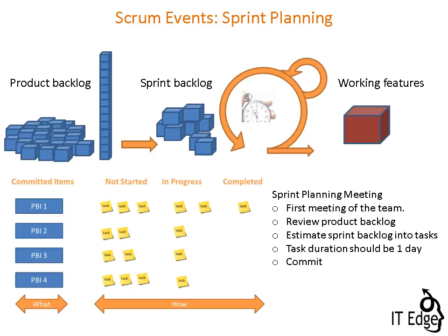The sprint planning allows the team to determine the amount to be produced during the iteration. It is during the sprint planning that the estimation of the work will be done. The estimation can be done in several ways. We will review this later. The product owner and the team are mandatory for this meeting. The Scrum Master may also participate.